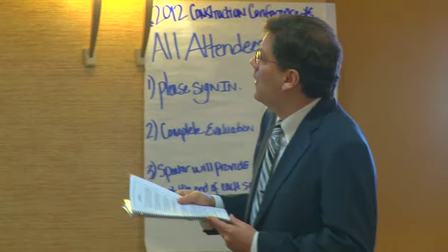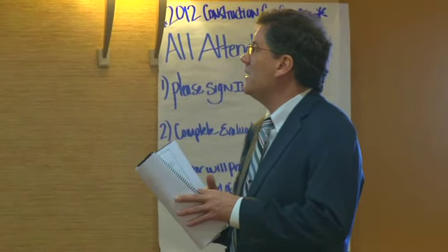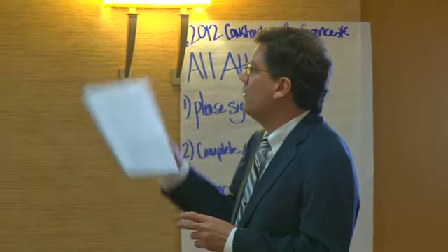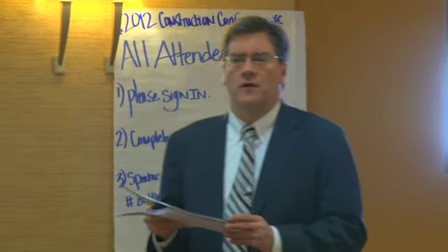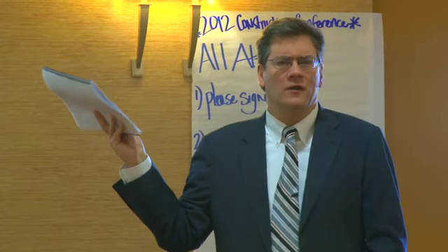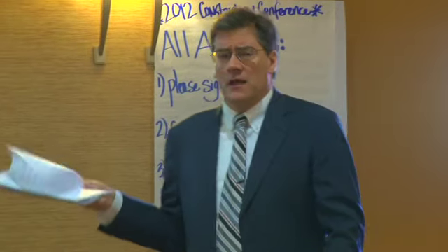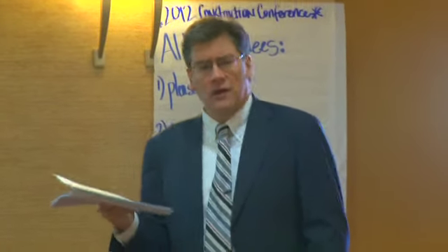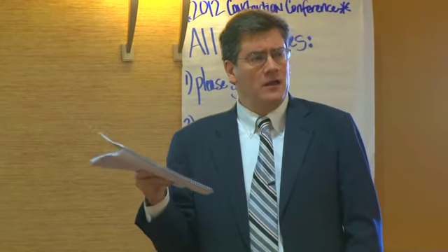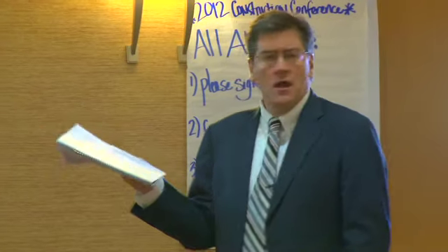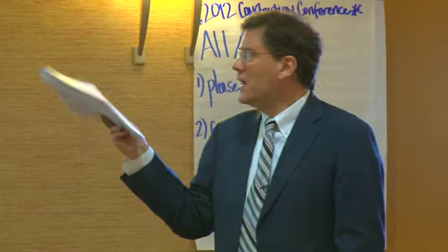Okay? What if there are defects in form? Unlike lien claims, it's not invalid by reason of a defect in form if it's sufficient to substantially inform the owner of the information required by the article. What is going on here? What is this about? Well, the legislature got an earful when all these lien claims were being filed against projects, and they wanted to provide an alternative remedy where there's not a contamination of title and people are still getting paid. That's what a stop notice is. This is not recorded. This is mailed like a preliminary notice.